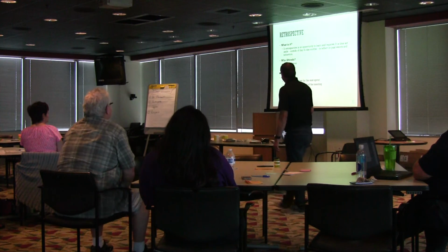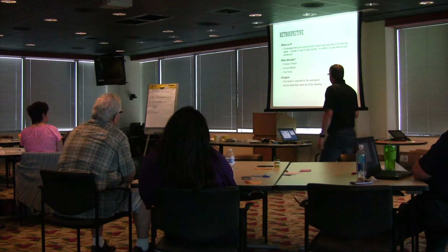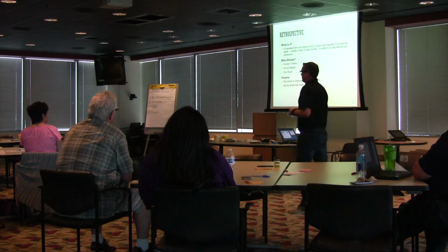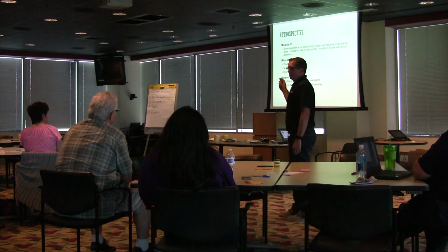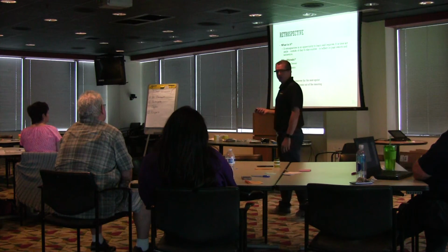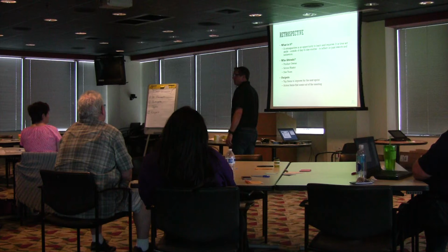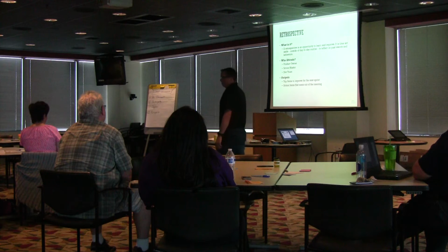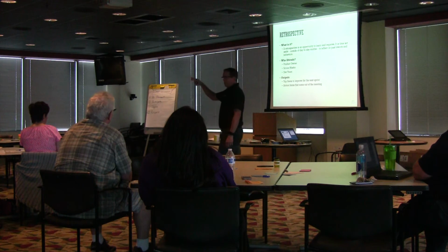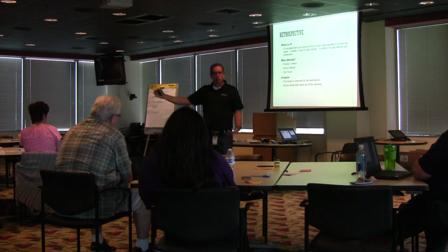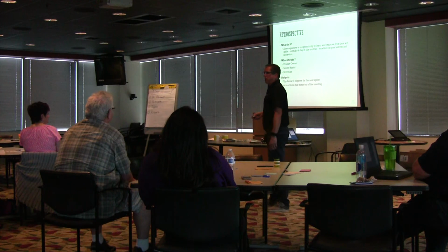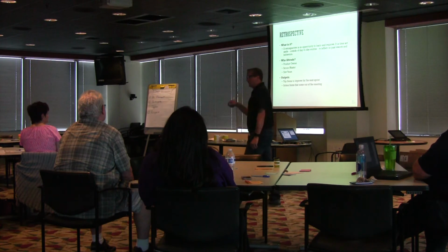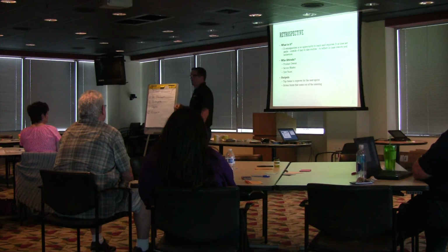Product owner, Scrum Master, and dev team are all in attendance for this. The top items to approve are excellent action items. There are next steps or action items. So we talked about good experiments. Say you come out of the retrospective and you said these 10 things aren't working for us. Don't solve all 10. Not yet. Solve one or two. Pick the most, you know, most hurtful. I don't know the word I'm looking for. The thing that you think will give you as a team the biggest bang for the buck, right? Make that modification. Make an effort. Make a commitment to work on that for the next sprint.